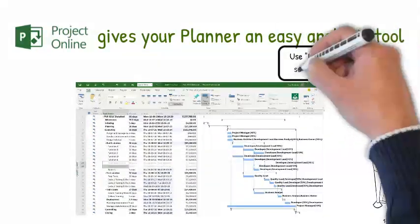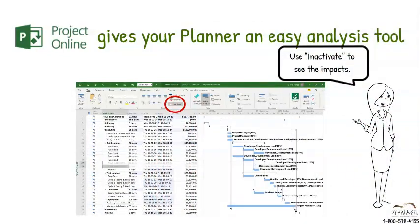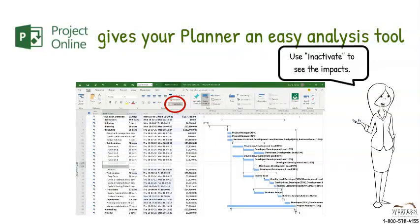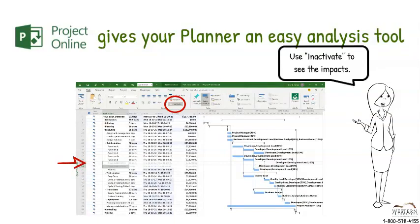The inactivate button allows you to turn each activity on and off or even do the same to full WBS structures. When inactivated, the activity is greyed out in your schedule and it's like it doesn't even exist.